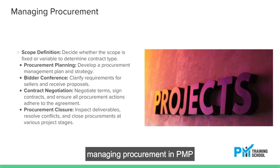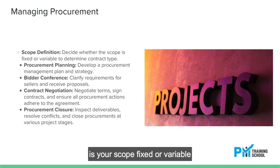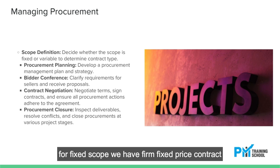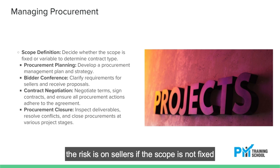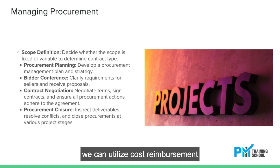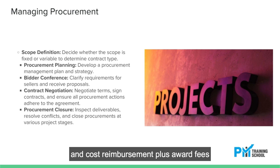Managing Procurement in PMP: Decide what you want to do — is your scope fixed or variable? For fixed scope, we have firm fixed price contract, fixed price incentive fees contract, and fixed price economic price adjustment. The risk is on sellers. If the scope is not fixed, we can utilize cost reimbursement, cost reimbursement plus incentive fees, and cost reimbursement plus award fees.